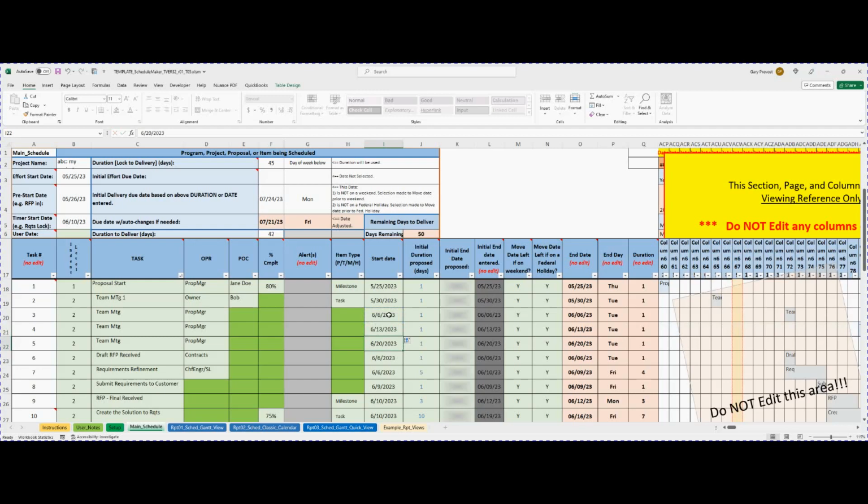I'll just complete this: equals the date before me, plus 7 days. And you can see everything turns out to be a Tuesday here. What happens is, when you change the initial date that everything is based off of, 5/25, if you change that to 5/26, which will end up on a Friday, all the other dates will change to a Wednesday. So use your decisions on how you want to do this. You can always use different values, or I'm going to undo that.